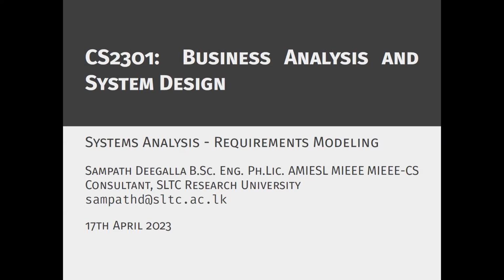So if you summarize what we have done last time, we talked about PERT or CPM charts used for project scheduling. And also, sometimes I have seen you might use Gantt charts, which could be used to plan your projects. So in your case, it will be basically your software project, and you have to break down the tasks first. We call this the work breakdown structure, if you remember from our previous session. And then once you identify the tasks, you have to decide on the average time each takes. So calculating the average time you need, we look at the best estimate as well as the worst estimate and the possible case estimate, and we use a small formula to identify the duration.